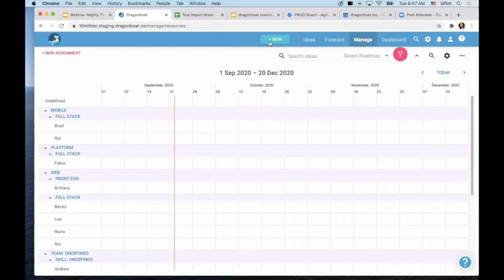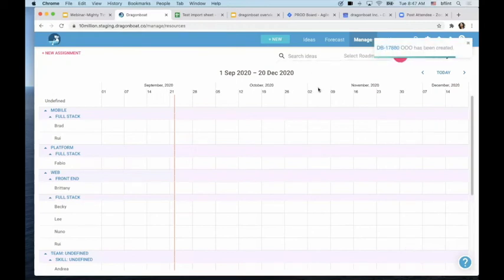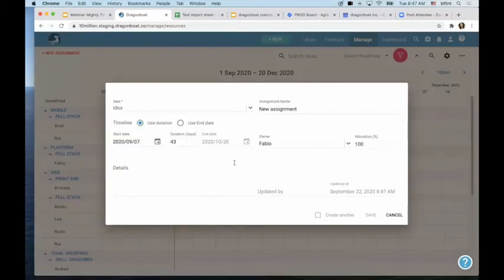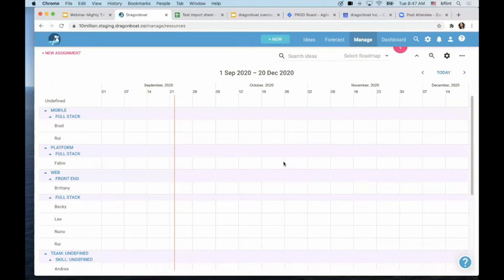Okay. So I don't know if we have it today, but you can create something kind of like out of office. Just create one here as a project, and then you will say this person is on holiday or maternity leave and whatnot. So you basically use this placeholder to add to it. I think this one's filtered out. I need to update that. But you get the idea. You can create the vacation and the holiday as a placeholder, and then you can use block people as time.